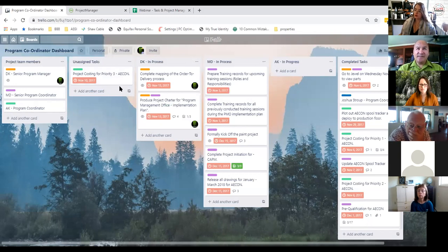This planned effort would not come from the PM. The planned effort would come from the person doing the task, right? So if I allocate this to AK, he would come to me and say, for that task, it's going to take me 4 hours. Okay, I'm going to challenge that. It's my job, right? So as I look at it a little bit more, I may agree with it.